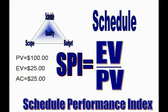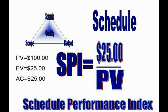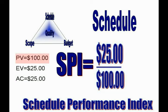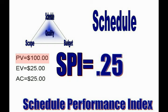The schedule performance index is calculated by dividing earned value by planned value. In our example, we earned $25 of value on a task that has a $100 planned value, so our schedule performance index is 0.25, which indicates serious schedule problems.